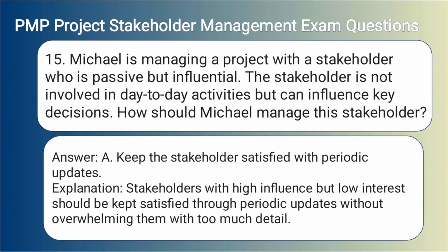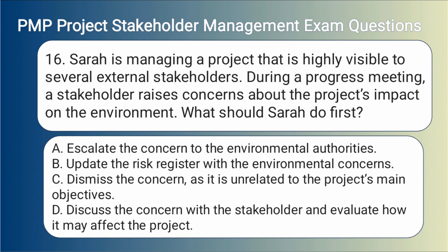Answer: A. Keep the stakeholder satisfied with periodic updates. Explanation: Stakeholders with high influence but low interest should be kept satisfied through periodic updates without overwhelming them with too much detail.